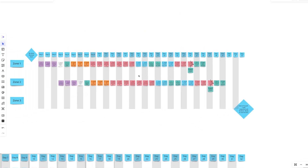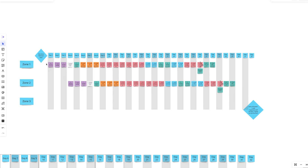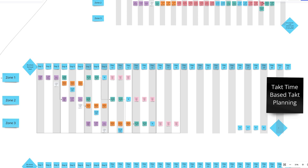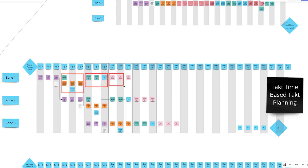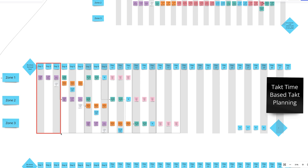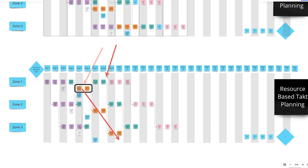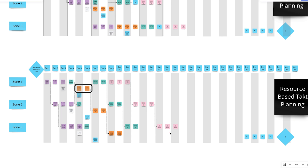On Miro, once you're done you copy the sequence down to all 11 zones to hit your milestone. For takt-time-based takt planning, you force everything into a takt time — say three days — adjusting crew counts intentionally to package work into that rhythm. Alternatively, resource-based takt planning lets each activity have its own rhythm: fire sprinkler on a two-day rhythm, priority walls on a two-day rhythm, reaching the three-day takt time later.